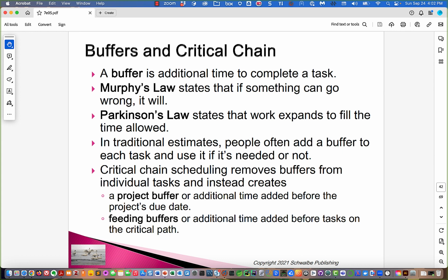If you remember back a couple of slides ago, we were summarizing what the project manager did in the case from the textbook, and she said that they ought to pick one estimate for the task and it ought to have a 50% probability, which means it should be equally likely that they came in early or came in late. That it was the statistical average of where they were going to be.